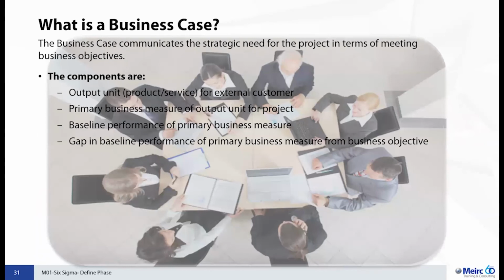I want to discuss a little bit on the business case, which basically answers the question, why would you do this project strategically? If the CEO comes to you and says, why is this project important to us as an organization? The best thing to do is to try to connect that project to a strategic objective. Your vision, your mission, and your strategic objectives might be a good place to look and try to establish that link. Do you have a primary business measure, measuring maybe customer satisfaction? Many companies will have that. Can we connect that and say that this project supports that strategic objective? Hence, we can have that business case in place, and we can defend our project if someone comes in and says, I don't see the linkage between your projects and our business or our strategy. Then you have already established that, and you can answer that question.